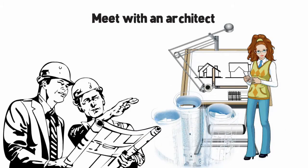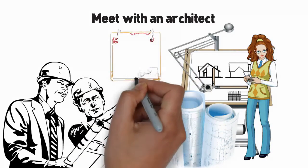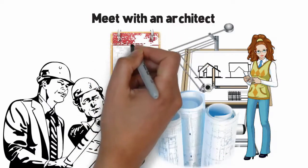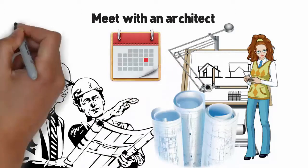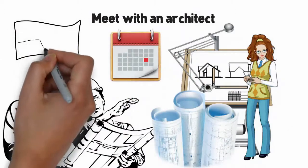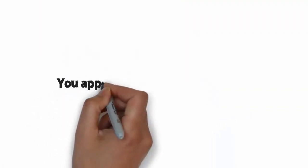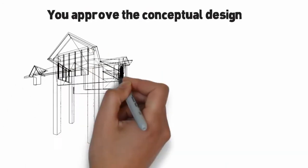The initial plan design fee covers the basic design of the home. Later, we will need what we call working drawings. Please note, this process usually takes 8 weeks from start to finish. If you already have a conceptual plan in process, the plan design documentation should be done in 3 weeks. The design fee is paid when the design process starts, but can be added to your construction loan if you prefer.